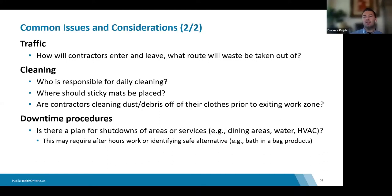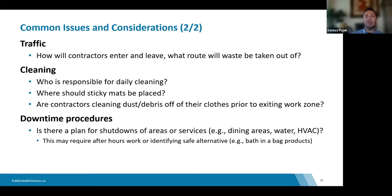Traffic is also an important consideration — how will materials actually come to the space? Even though materials like drywall coming in may be new, they come from warehouses where they may have been stored inadequately, with possible moisture or mold growth before arriving at your facility. Everything being brought in needs to be assessed, and how it's brought in and how debris leaves the facility must also be done safely. Cleaning responsibilities should also be clearly defined — construction clean versus facility clean.